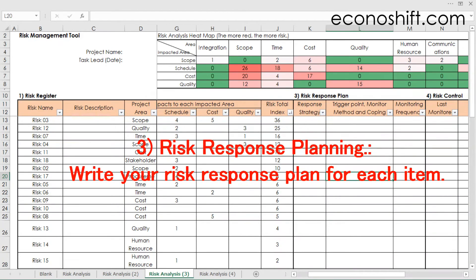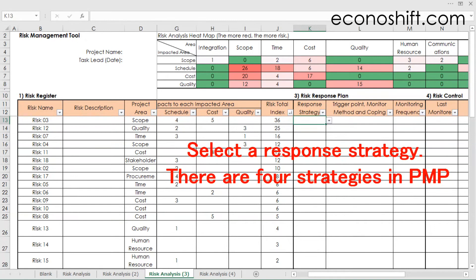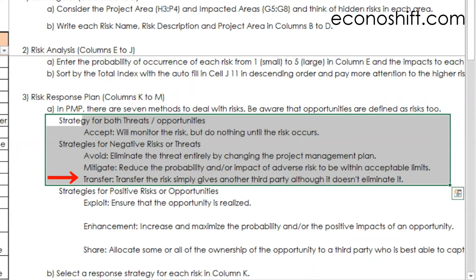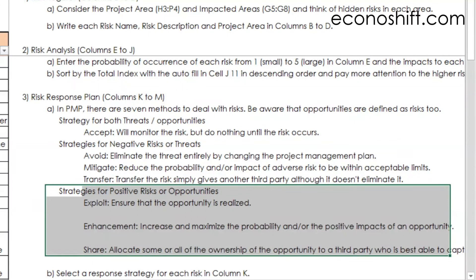Write your risk response plan for each item. First, select a response strategy. There are four strategies in PMP you can choose from: Accept — acknowledge the risk and don't take any action unless the risk occurs. Avoid — by changing project management plans, eliminate the threat entirely. Mitigate — reduce the probability and/or impact of an adverse risk to within acceptable threshold limits. Transfer — shift the impact of a threat to a third party together with ownership of the response. There are also three more strategies for positive risks, which are opportunities — please read about them later.